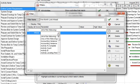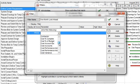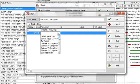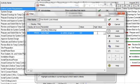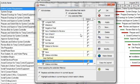Then go down to the parameter field and select Early Start. Under the Is field, select Is Within the Range Of. Under the Value field, select DD for the data date. And then in the High Value field, type DD plus one month, meaning all values that are within one month of the data date.